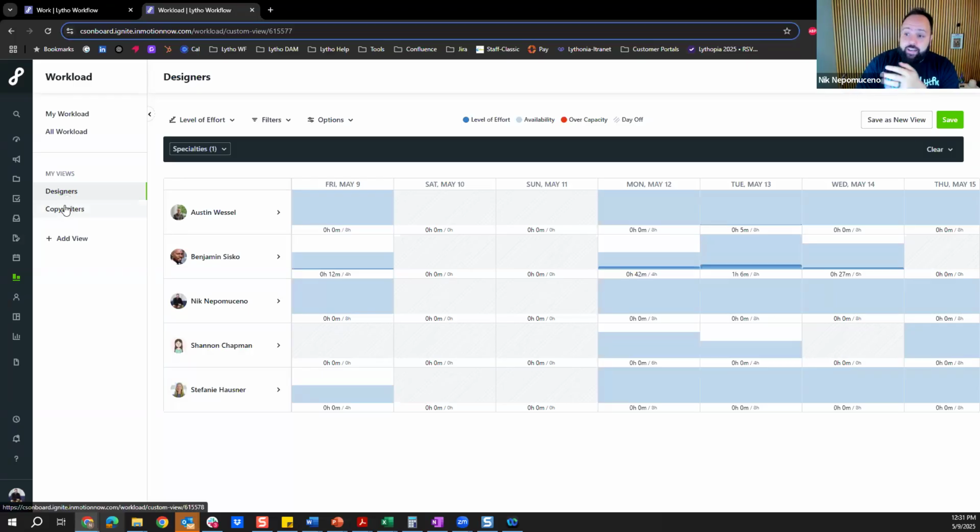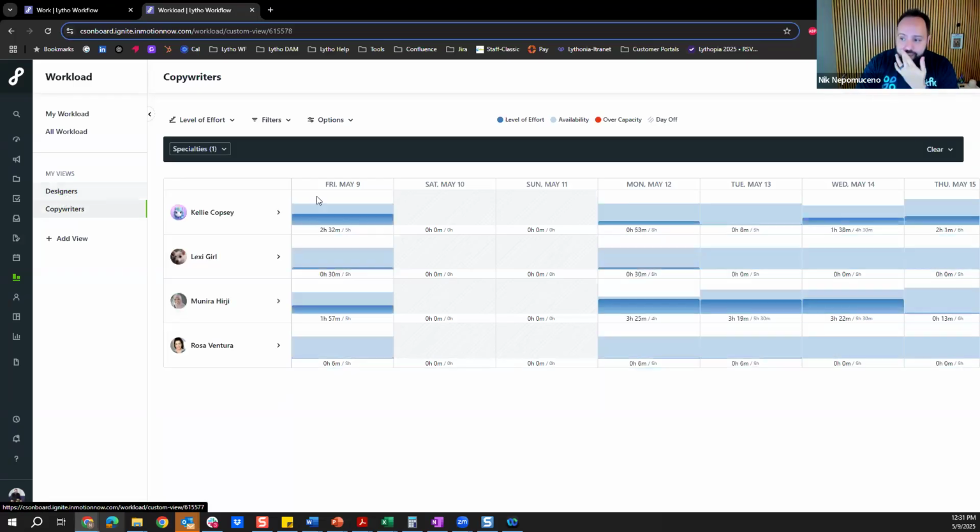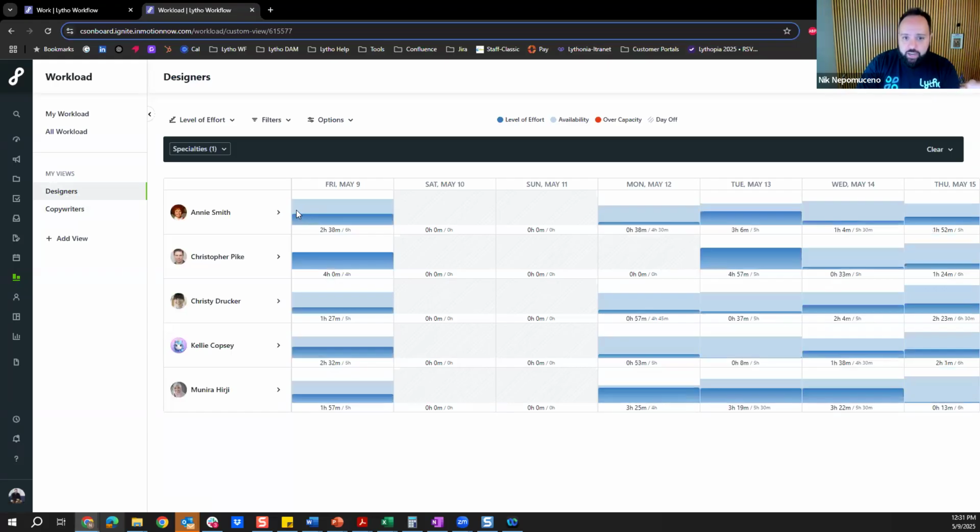And that is one thing that we haven't mentioned as much yet, track time, right? We know that it's a bit controversial, but it is something that will really help you plan for next year, right? LOE is an estimation of how much time we think this will take. Time track will give you the actual.